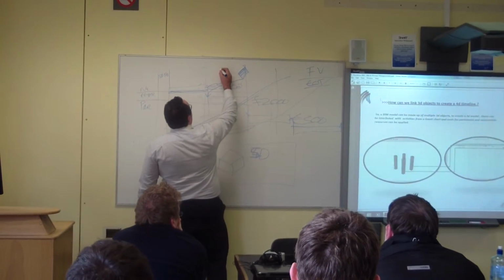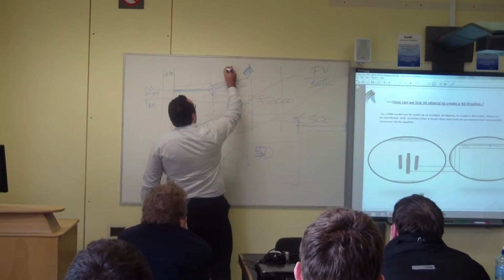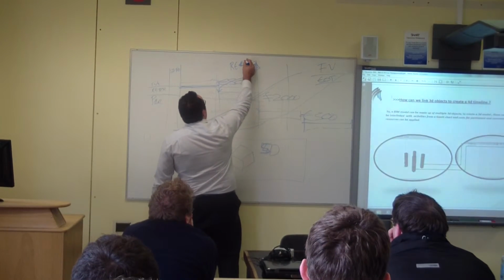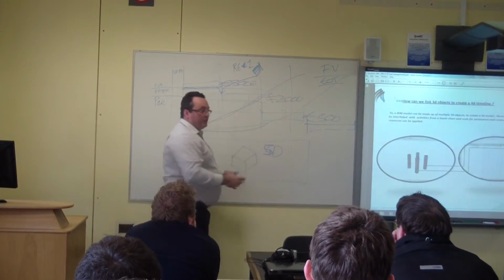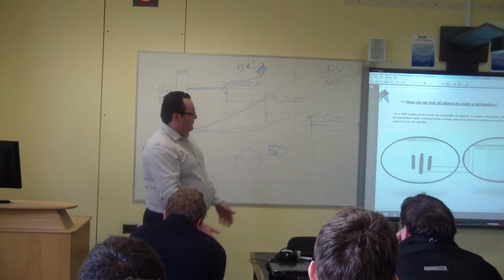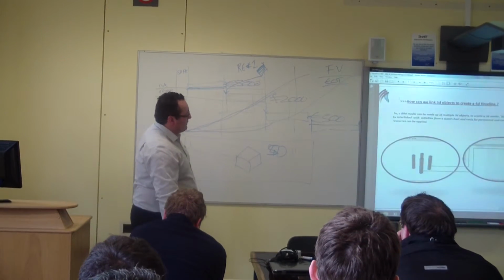And call it a relevant event number such and such 1. Bang, there you go. That's called time impact analysis, right? And that's the basics of a forensic analysis. There's about 3 or 4 different methods.